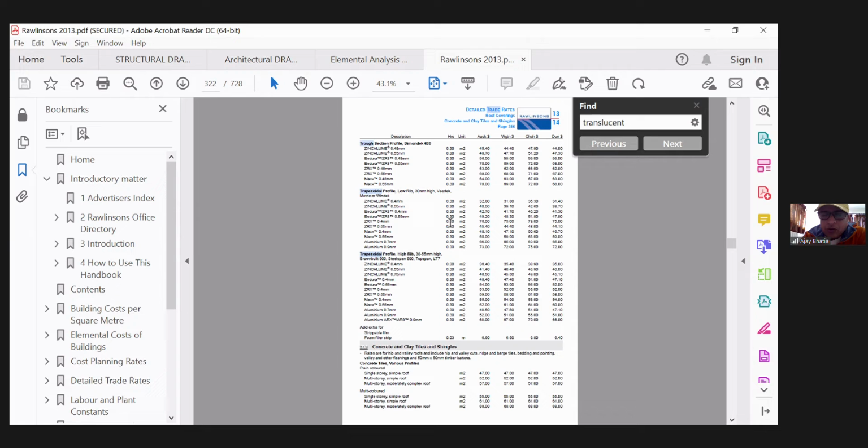That way, you're going a little extra because you're doubling up for a little area of translucent, but that doesn't make much difference because in any case, your cost estimation is a little higher rather than lower. So it's always good to be a little higher than lower than the actual cost. So for the basic price for estimation, select a higher price. In QS, you always go for higher.